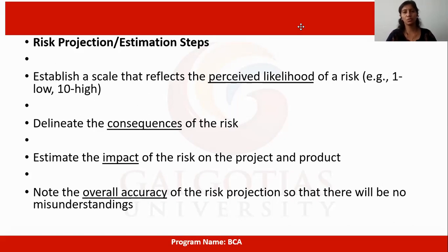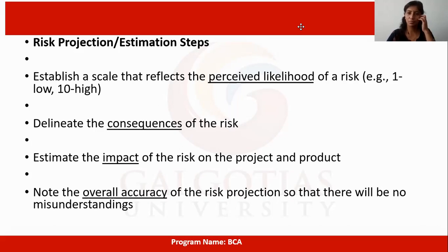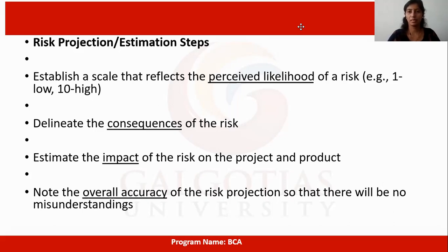We will have to make a table and predetermine what each risk is. On a scale of 1 to 10, we measure the risk and establish a scale that reflects the perceived likelihood of a risk. How far the effect of a risk would reach can be predetermined with the scale and its level.